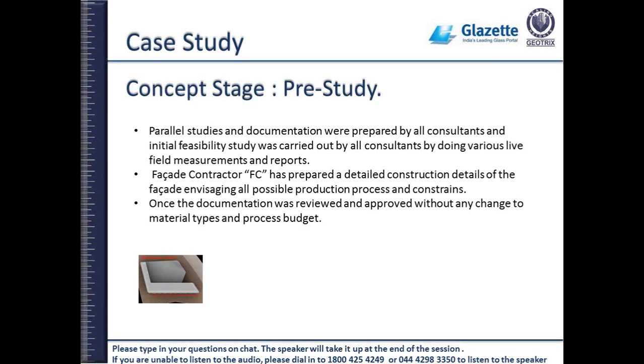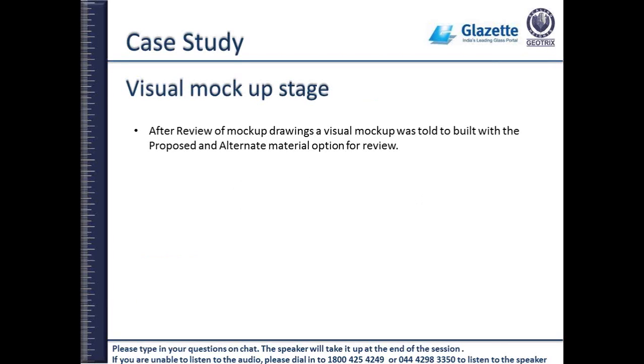So the client and the architect agreed to say, yes, we will build a live model of a portion of this building to understand the material, the commercials, and the time required. So we are going live before even the project started to build a complete mock-up. So all the documentation was carried forward to a mock-up stage. So we prepared a complete mock-up review, which I believe was a 3-story temporary mock-up structure, where the drawings and details were prepared and approved with the materials.